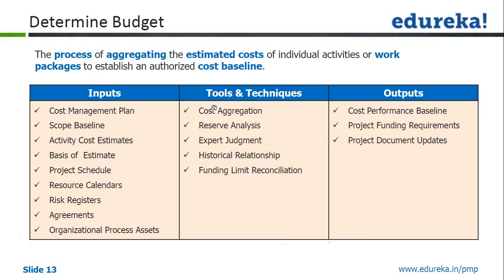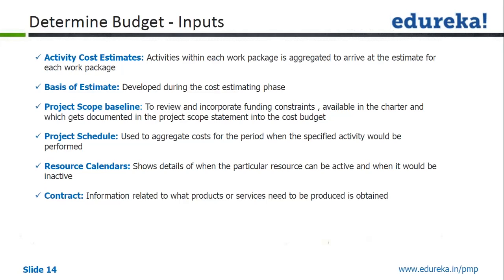The main input for Determine Budget is activity cost estimate, which will be aggregated to work package level, then to control account, and then essentially to your cost baseline. Activities within each work package are aggregated to arrive at the estimate for each work package. Basis of estimate is developed during the cost estimating phase. Project scope baseline is used to review and incorporate funding constraints available in the charter and project scope statement into the cost budget.